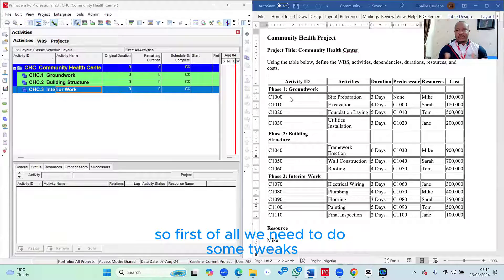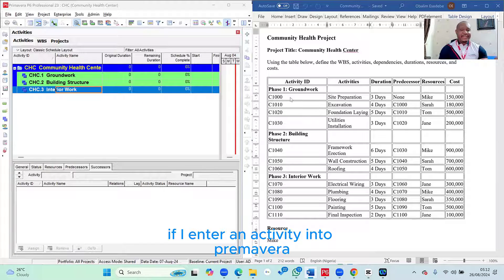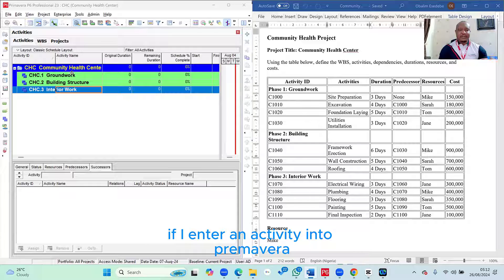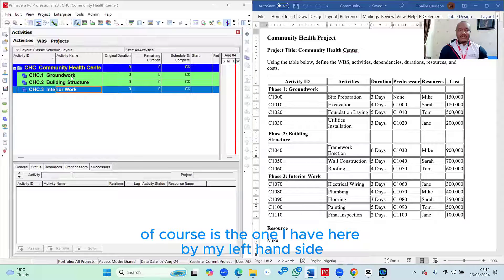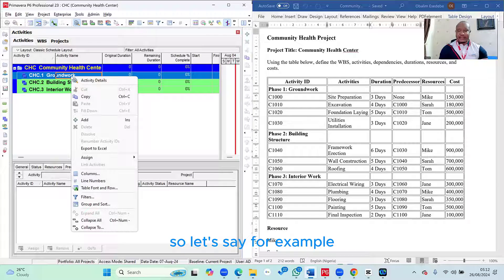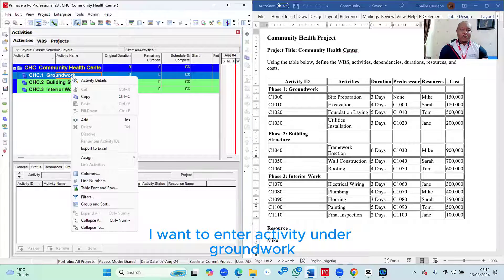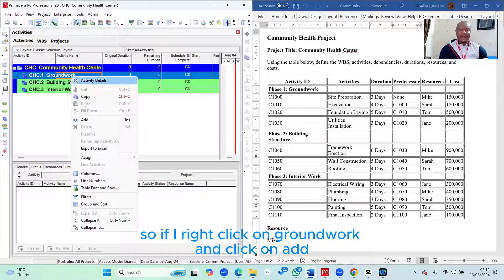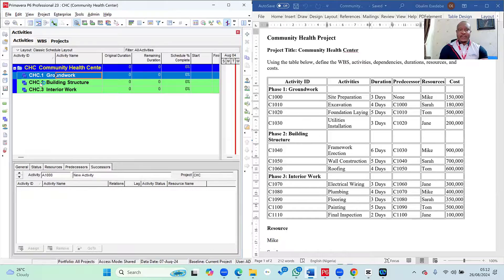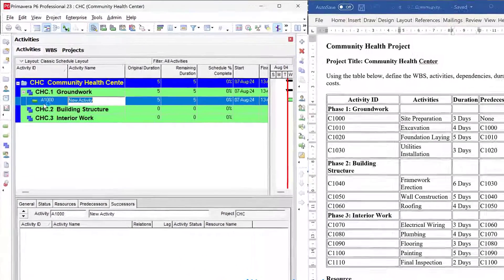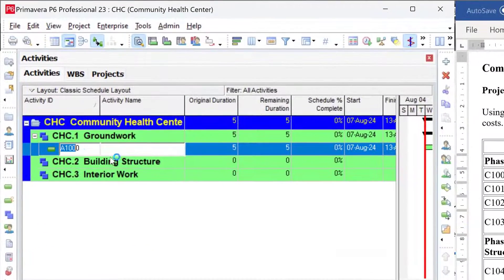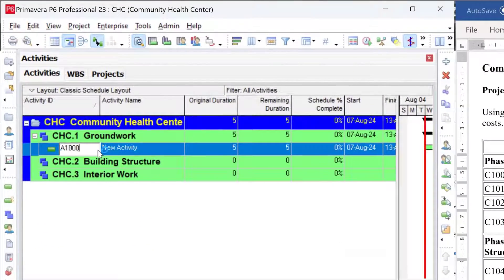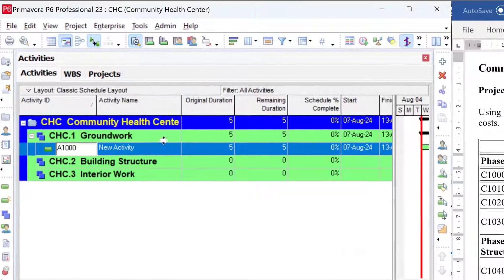So first of all, we need to do some tweaks. If I enter an activity in Primavera, Primavera is the one I have here by my left-hand side. So let's say, for example, I want to enter activity under Groundwork. So if I right-click on Groundwork and click on Add, you will notice it creates an activity for me and gives it an activity ID A1000.